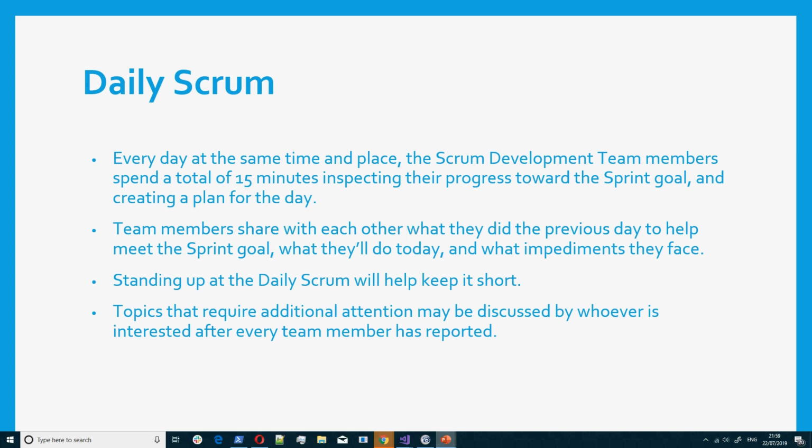In some cases, it might not be more than 10 or 5 minutes, because you are not meant to say too much. You are all meant to give reports of what you did yesterday, what you are going to do today, and if there are any impediments that you face. So those are the things that you would be saying.